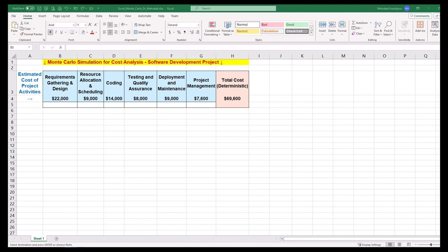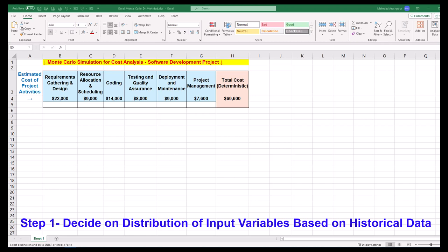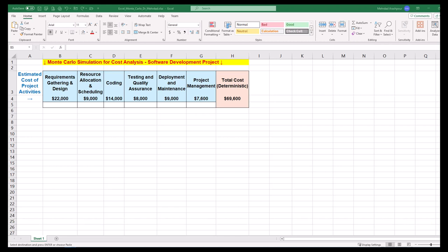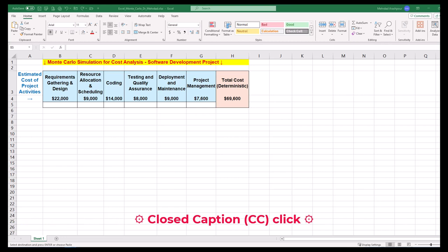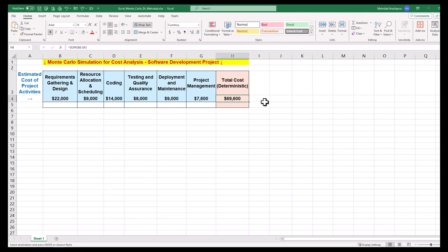Let's focus on stochastic cost modeling of a project. We can follow only four simple steps in Excel to perform Monte Carlo simulation for our risk management example, based on ISO 31000, which is the international standard for risk management. Step one is to decide on distribution of input variables based on historical project data. Let's start by analyzing the provided spreadsheet, accounting for six activities in a software development project with a deterministic estimated cost of $69,600.